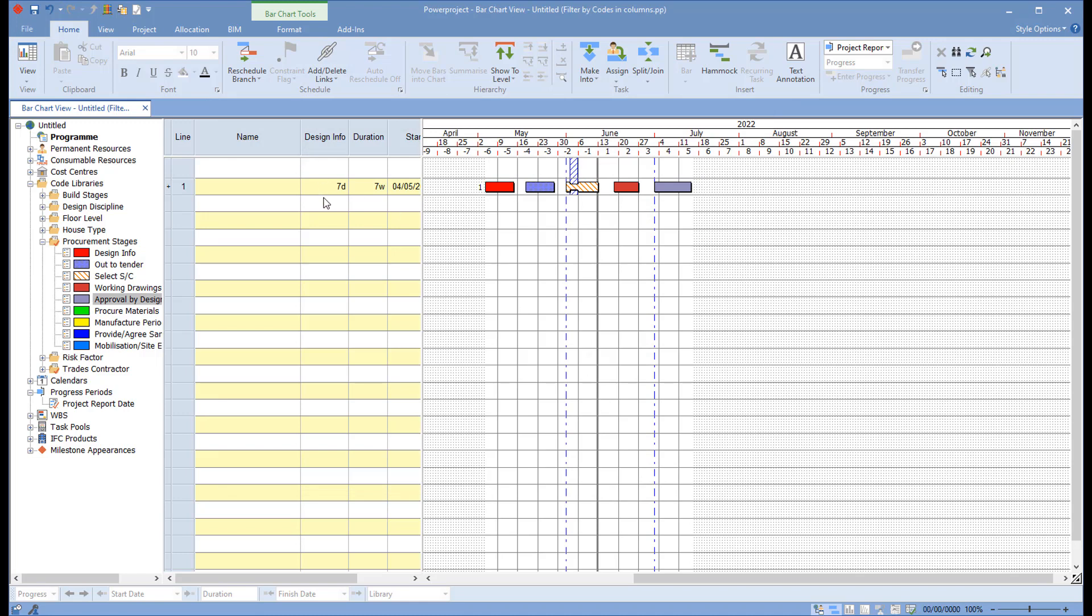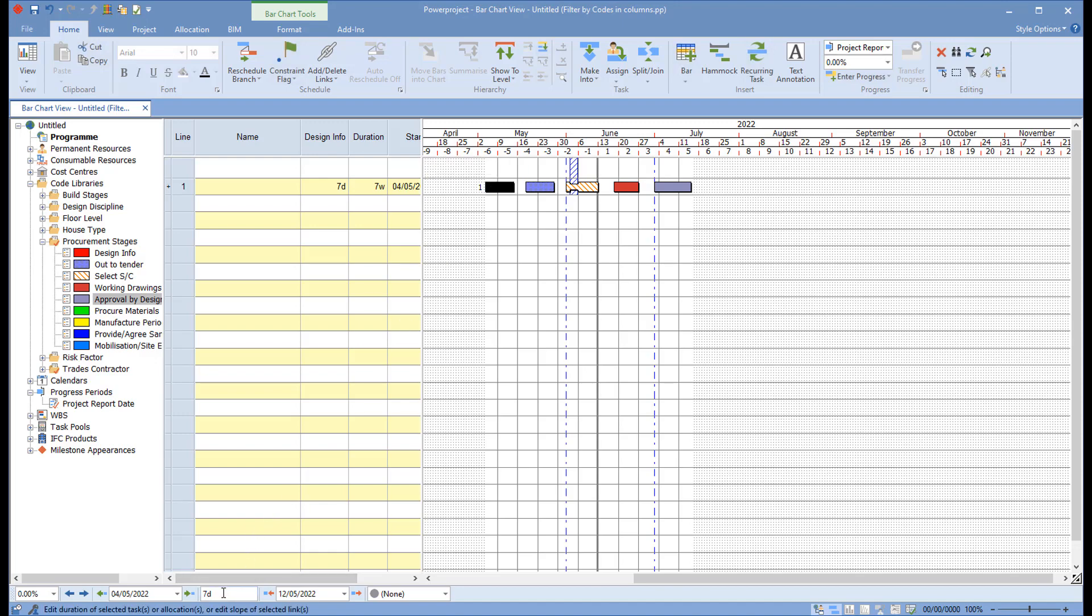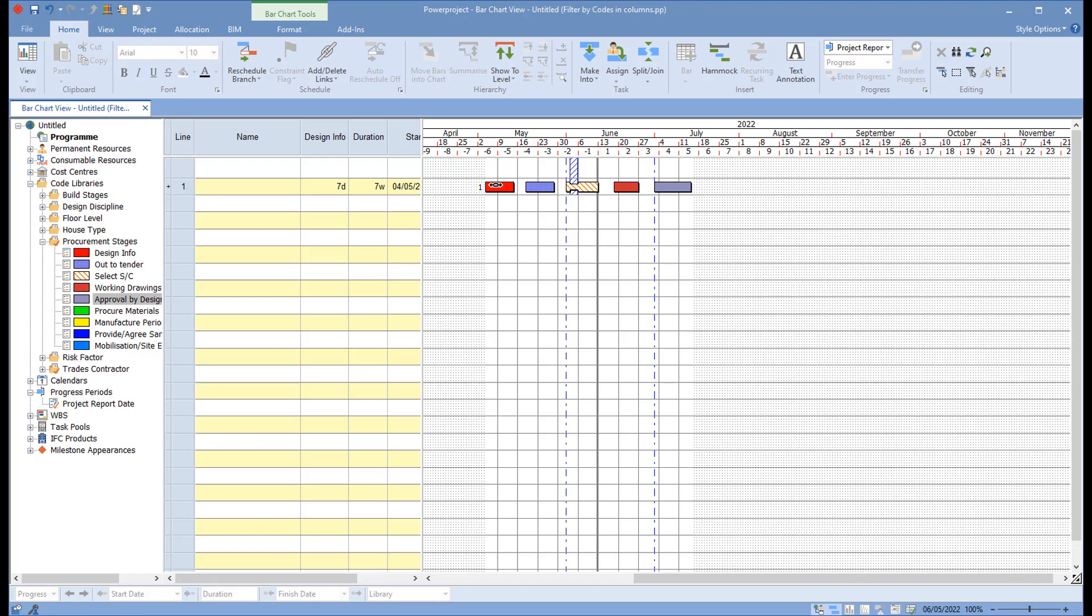And now my design info is in seven days. And if I click on this one here, you can see down here it's seven days in duration. Now, not only does this allow me to see this, to any column I add I can specifically point to a code library.